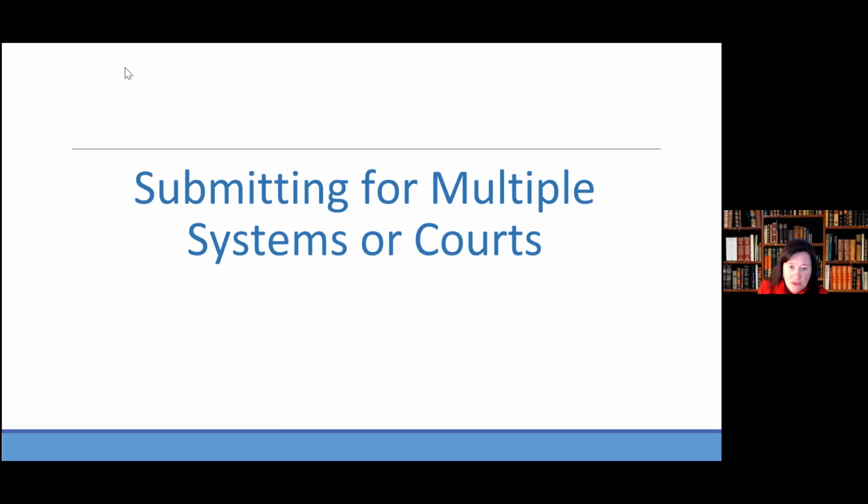If you're looking to exceed a category, like supplies or something like that, you might not know that you're nearing the cap and you have another need for additional supplies or a computer or something like that. But yes, you can see that there's language in our contract related to the 5% cap, that up to that you don't need authorization, but in excess you need the authorization through this line item transfer process. Hopefully that answers your question, Pete.